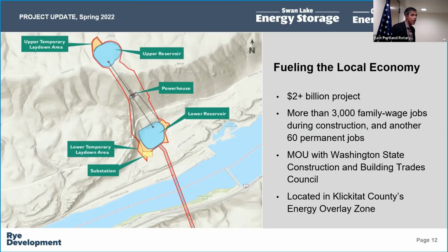of the public. And one of the most important studies recommended early on by the community was what's going to happen to our groundwater. And we think this is going to impact our wells down valley. And part of our approach here was to study the aquifer system well ahead of doing anything and propose something that we felt the Water Resources Department could endorse from a sustainability standpoint.